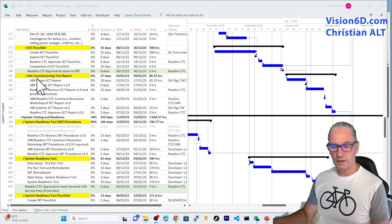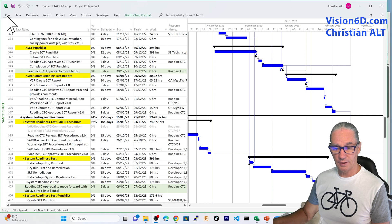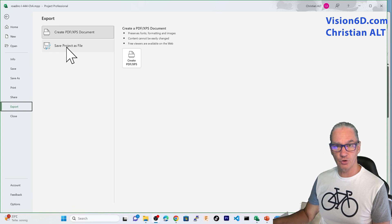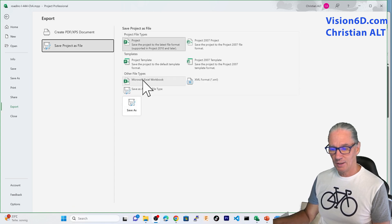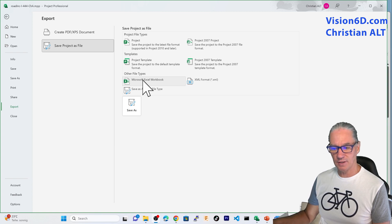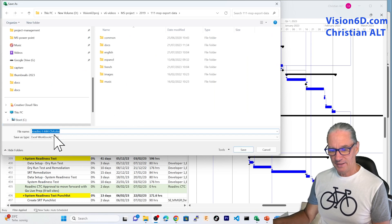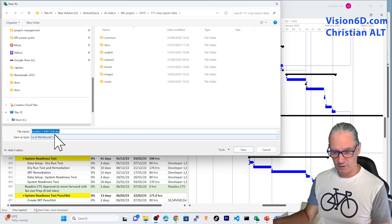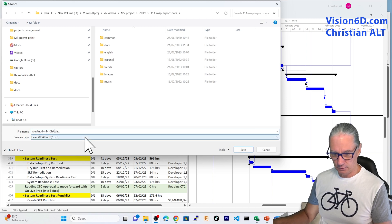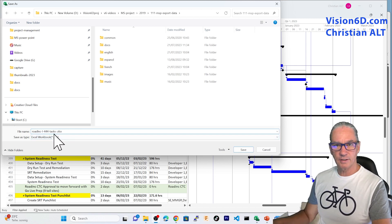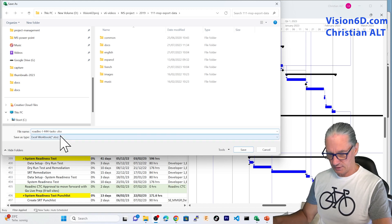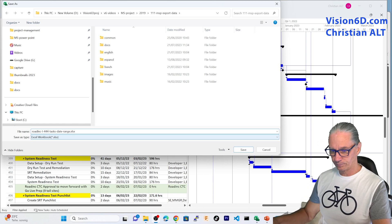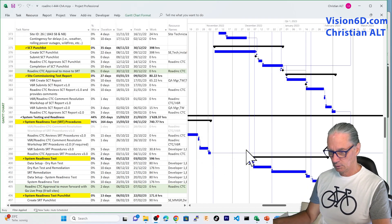Exporting data is really simple. For that, I go into File. From there, I choose Export and here, I will choose to save project as a file. In my case, I'm interested in saving this as an Excel file. So, I go into Save As and then, it's going to ask me the name of the Excel file. I'm leaving the project name. I'm saying that I'm exporting the tasks and they will be in a certain date range. Save.